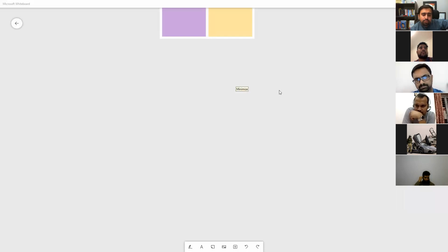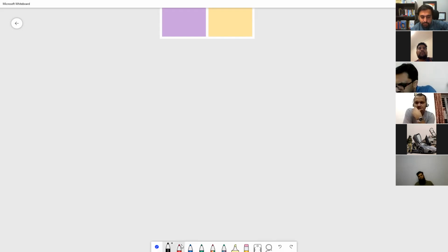One more burn down chart we make in agile is the risk burn down chart. It's just like the normal burn down chart: as we move along, the risk should move down. If the risk is not moving down, this means we are not tackling the risk. Remember, in agile we work on high value, high risk items first. So that's all about agile.